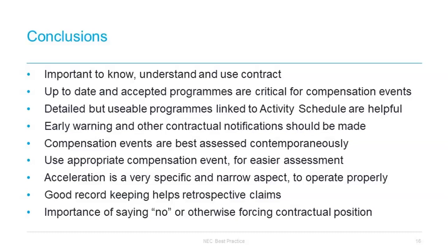The key thing with compensation events is to use defined cost where you can, even if there is some resistance from the other side. Do them contemporaneously. The quicker you are in dealing with these things, the less of a problem they become. It is much more difficult to leave the assessment or consideration of compensation events until later, particularly if they involve time.